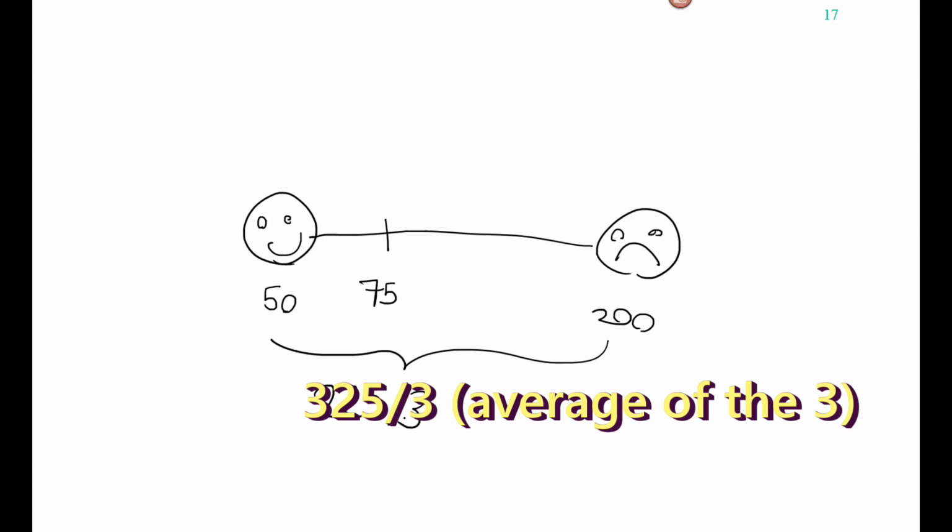Of course, in activities that you know very little about, the distance between optimistic and pessimistic will be large. But this can be treated statistically, and we'll be working on that later in mandatory assignment number 2. I'll be discussing the techniques with you in the lectures later on.